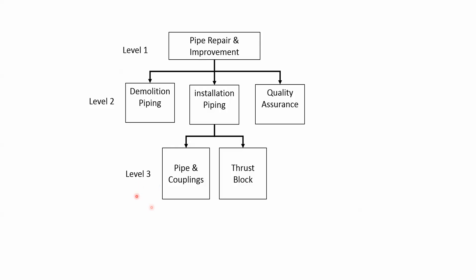What is common about all the WBS elements is that they are deliverable orientated. They are generally defined using nouns not verbs, and the WBS elements or work packages at the lowest levels — Demolition Piping, Pipe and Couplings, Thrust Block, and Quality Assurance — support the definition of the required tasks.